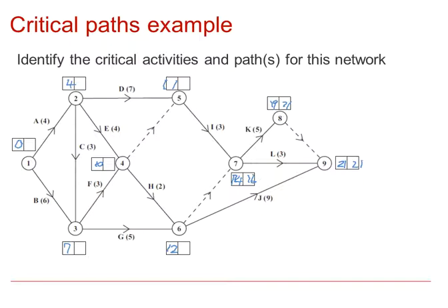21 take 9 will give a 12 in that box, leading to a 7 there. We have 12 take 2 is another 10 in that box. We have down to 16 take 3 is a 13 there.